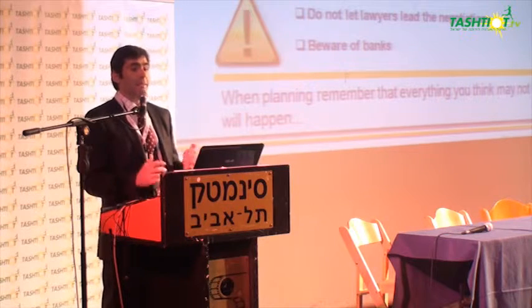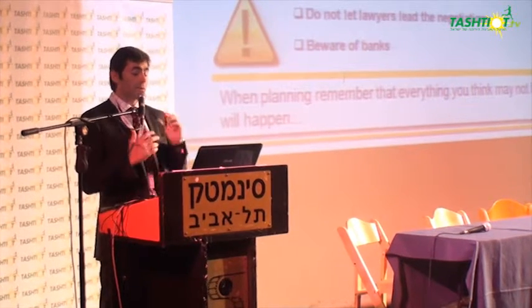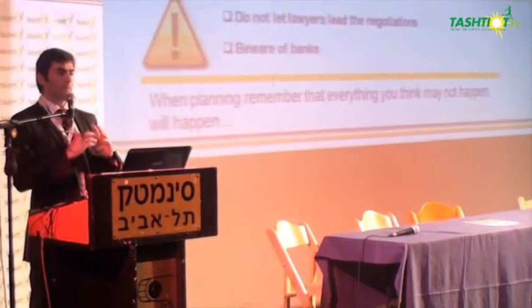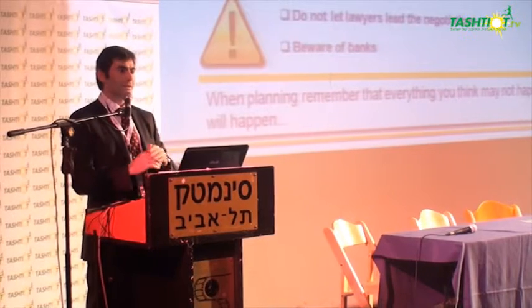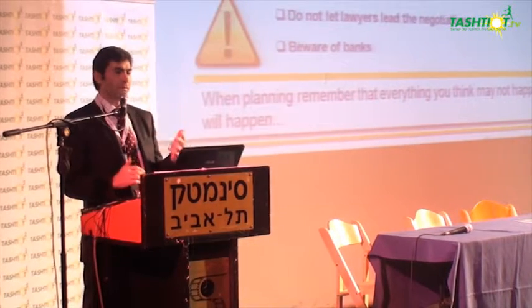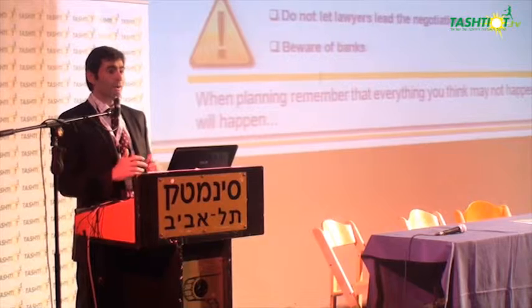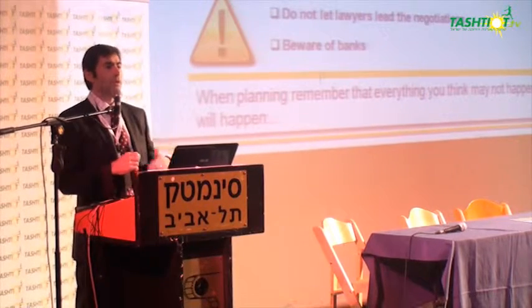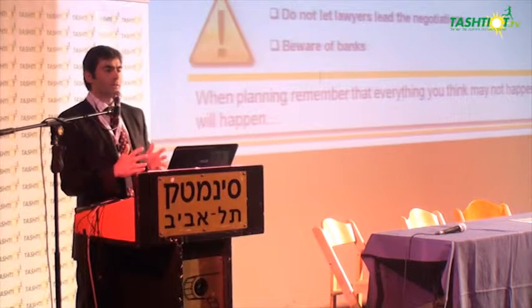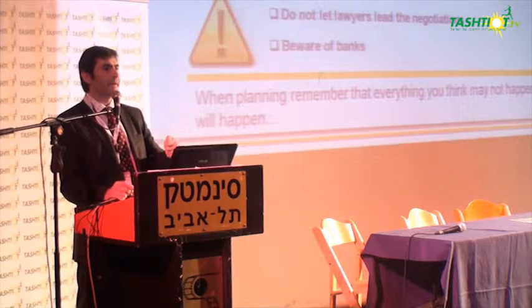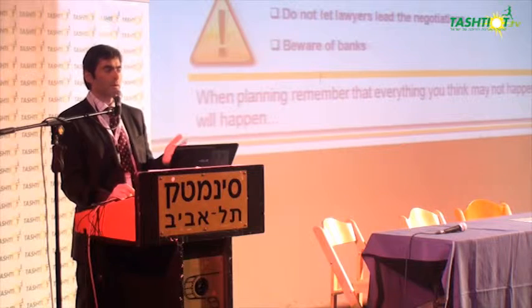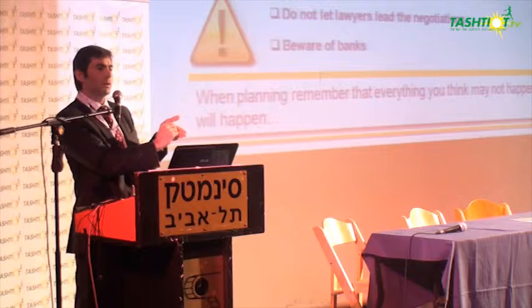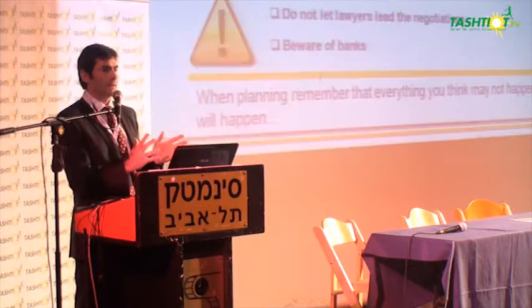Okay. As an EPC contractor, what you have to think of is that you have to plan everything ahead of time. Believe me, any planning you do is not enough, because you're going to have many problems, and you have to be ready with lots of working capital, like I said, because especially with project finance, you're going to get paid much later than what you think. Okay, you can say, no, but the contract says that when I do this milestone, I get paid. It's not exactly like that.